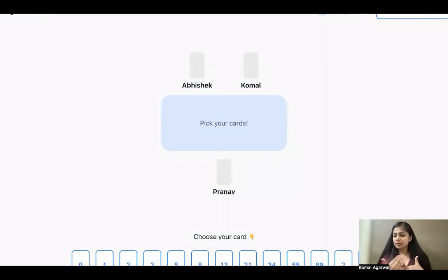Everything needs to be discussed and explained to the team members. If the team members have any questions related to the functionality or features, they would cross question the business analyst or the product owner, who will help answer all their questions. Once all questions have been answered, the Scrum Master asks team members to rate or vote: whatever you as an individual feel, this story would take this much time. Vote according to you.